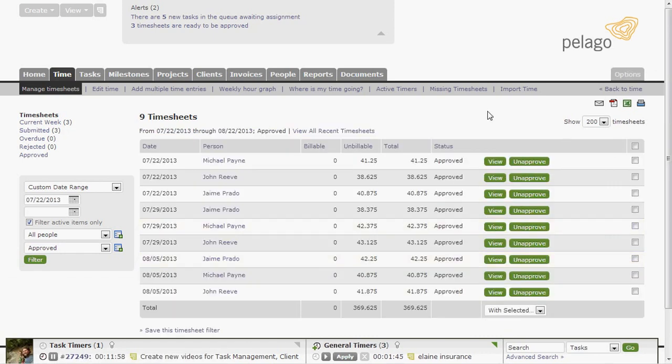And this is done for our customers with compliance needs and then also to help with billing for our customers that use invoicing. When a timesheet is approved, that week in question for that particular user cannot be edited. You can't add new time. You can't edit time. If you have a scenario where you actually need to change the time, you can go in, look up the timesheet, run a filter, unapprove the time, edit it, make it billable, unbillable, move it to a different project, that type of thing, and then reapprove it, and that locks the week.